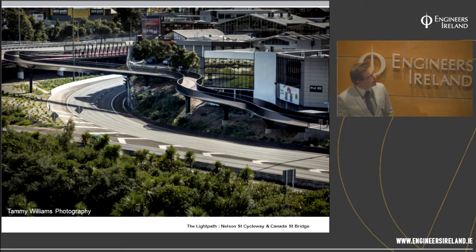The bridge on average only weighed 13.1 kilonewtons per metre and came in based on, well, the exchange rate at the moment, of about 4,250 euros per square metre. So it was quite successful in the end, even economically for the client, so we're pretty pleased with the outcome. I'll now hand you back to Stephen to take you on down through the rest of the off-ramp.